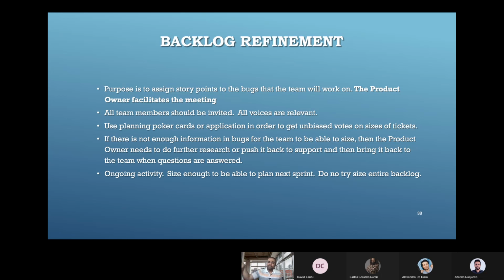Okay, sprint 15 is going on, so you can create sprint 16 and sprint 17, and maybe sprint 18 also sometimes, but at least sprint 16 and sprint 17 are created. They won't start the sprint, which means on the backlog board in Jira itself, you can see the current sprint is sprint 15, but sprint 16 and 17 are there.